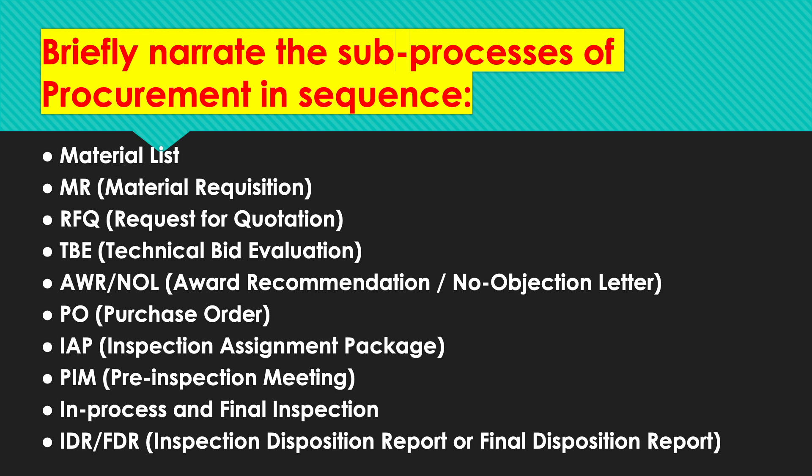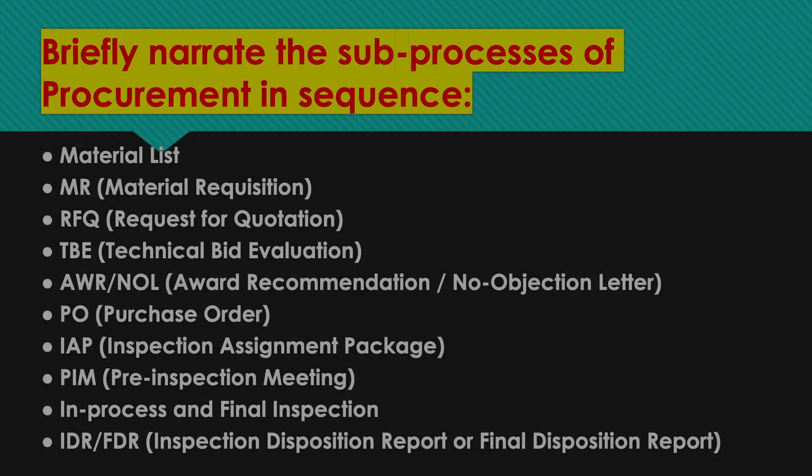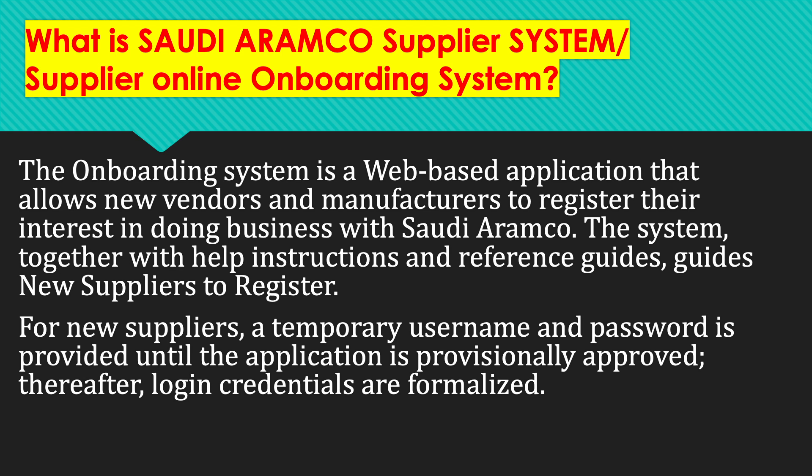The inspection assignment package is submitted to the client. With the IAP, a pre-inspection meeting is conducted together with the manufacturer, the vendor, and the client inspection team to finalize the ITP and start work. When work is ongoing, in-process and final inspections take place. After the material is released, the IDR and FDR are submitted to close the procurement process.